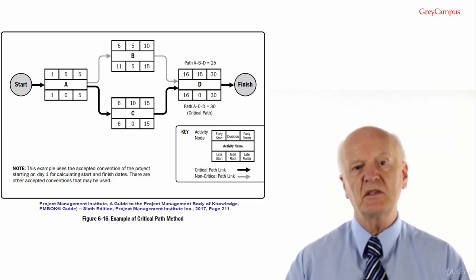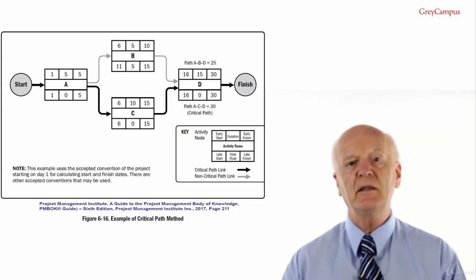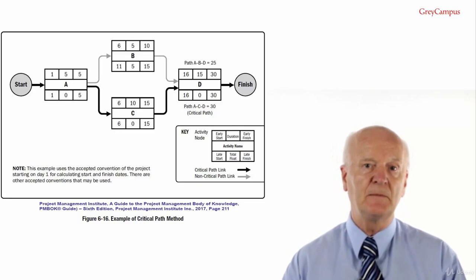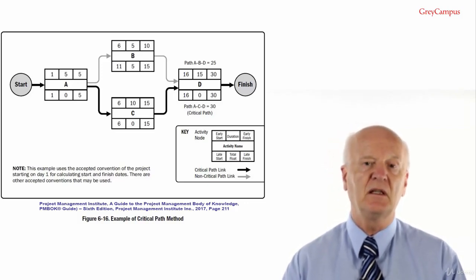As implemented with the precedence diagramming method sequencing, critical paths may have positive, 0 or negative total float depending upon the constraints applied. Positive total float is caused when the backward pass is calculated from a schedule constraint that is later than the early finish date that has been calculated during the forward pass calculation.